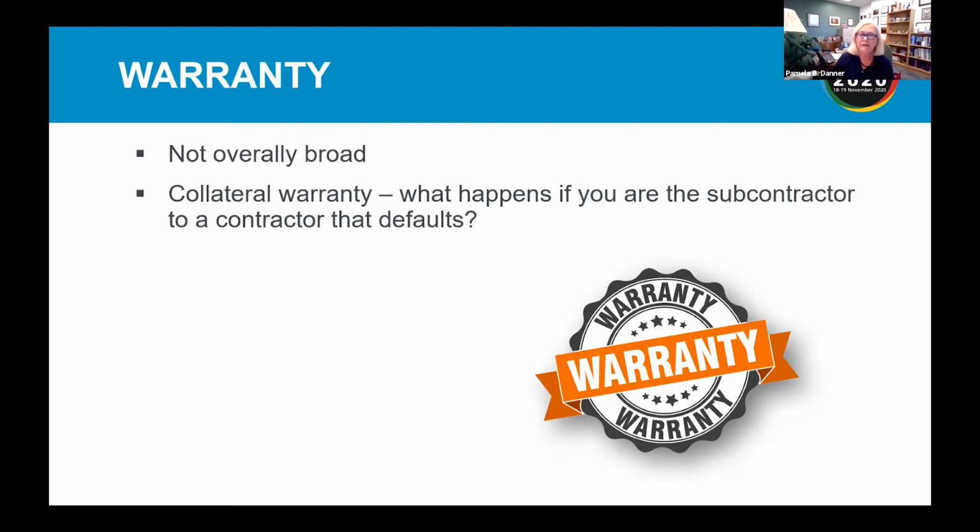Or the model from the International Federation of Consulting Engineers: the consultant shall have no other responsibility than to exercise reasonable skill, care, and diligence in the performance of his obligations under this agreement. That is your standard. That is a legal standard that basically you are to perform your services as another professional lighting designer would in like circumstances and at a professional level of reasonable care and diligence.